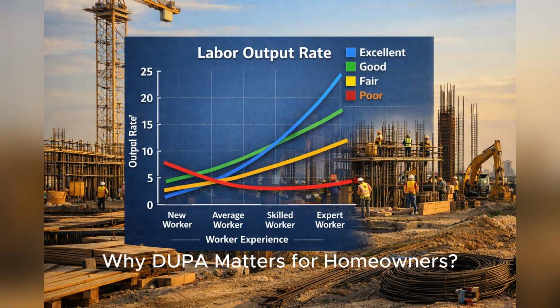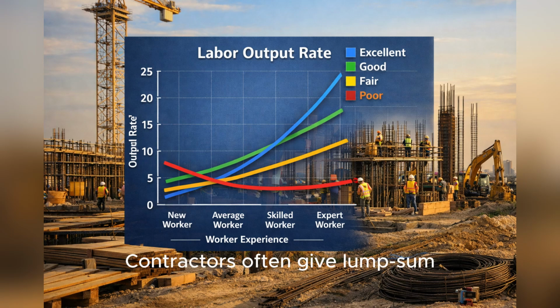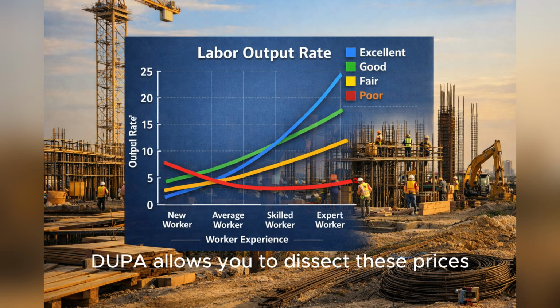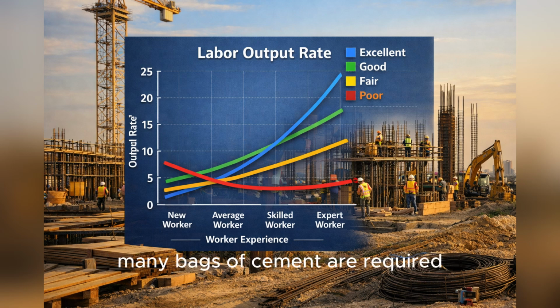Why DUPA matters for homeowners? Contractors often give lump sum prices that homeowners cannot verify. DUPA allows you to dissect these prices. You can see how many bags of cement are required, how many hours of labor are needed, which equipment is involved, and what overhead and profit should look like. With this knowledge, you will immediately see whether a quotation is inflated or realistic, giving you a strong negotiating advantage.